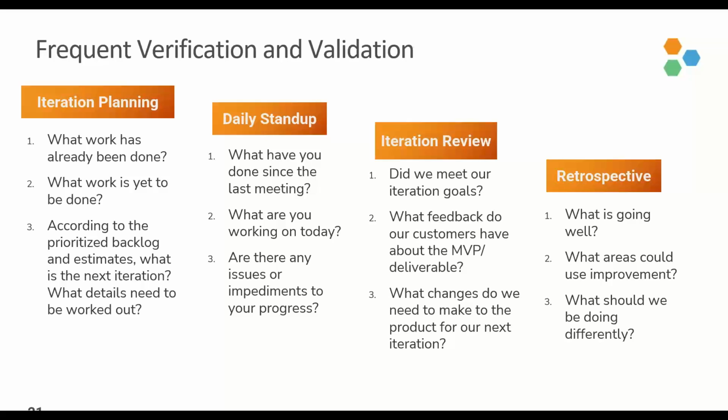Keep in mind, these are typically shorter meetings. I mean, some of these are very short, like daily stand-ups are usually around 15 minutes. And the goal is to seek answers to or address questions that you see on the slide here. So the agenda and purpose is clearly defined for each meeting.